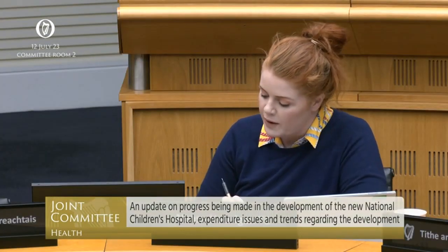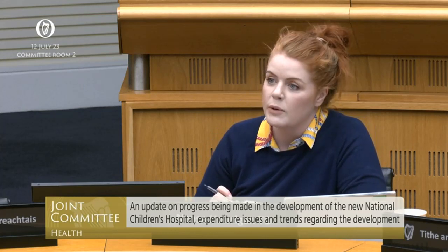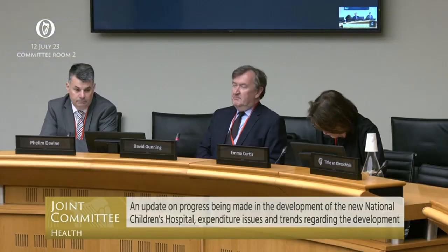Sorry, did you get a response from BAM on your correspondence with them on the withholding of 15%? We've had, I would say, endless correspondence on these matters. The situation with the 15% is we have done this before, a number of years ago. It's been through the conciliation and a decision from a conciliator, and I think it went to adjudication. We don't have a great degree of doubt that we will be able to enforce that 15%. But it starts at the end of July on that valuation certificate.